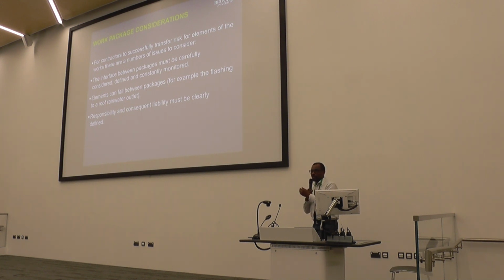You now need to find out from the one doing the first fix whether he has made adequate provisions for, let's say, the power requirements of the items being supplied. And with the electrical subcontractor coming to do the fixing, you also need to ask whether the contractor doing the first fix has adequately prepared the room for you. Which means you would introduce some sort of complexity.